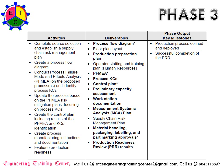These are all the major deliverables from Phase 3 of APQP. The phase output and key milestone is: production process defined and deployed — how the part is going to be produced, the process is defined and deployed — and successful completion of PRRs (Production Readiness Reviews). These are the main deliverables from Phase 3 of the APQP.